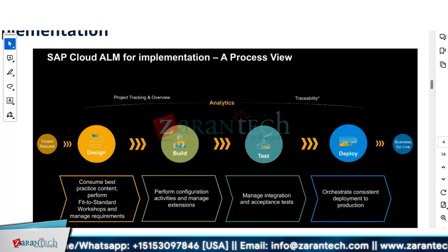Or you need access to run your testing in quality. You haven't developed it, but you don't have access in quality. You need an enhanced access level in quality to run the test, so you can write a mail or create a ticket, and they'll do it. But that won't work now, at least with a RISE with SAP project, because it is with SAP. You have to create an SR. It's there in the contract.